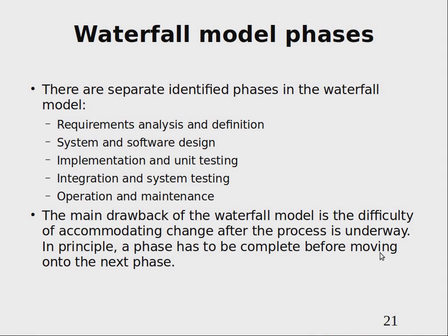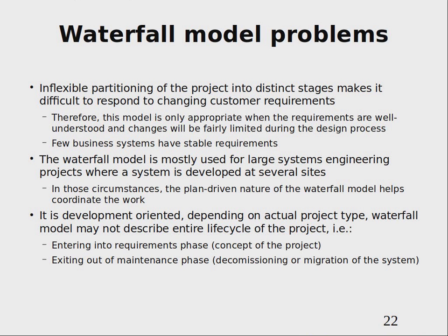If it is implemented efficiently, it is very cheap because you don't redo anything, you only do what is required and what is agreed. What is not so good is that if some external influences come into this project, you do not have any prescriptive model for how to behave on these changes.